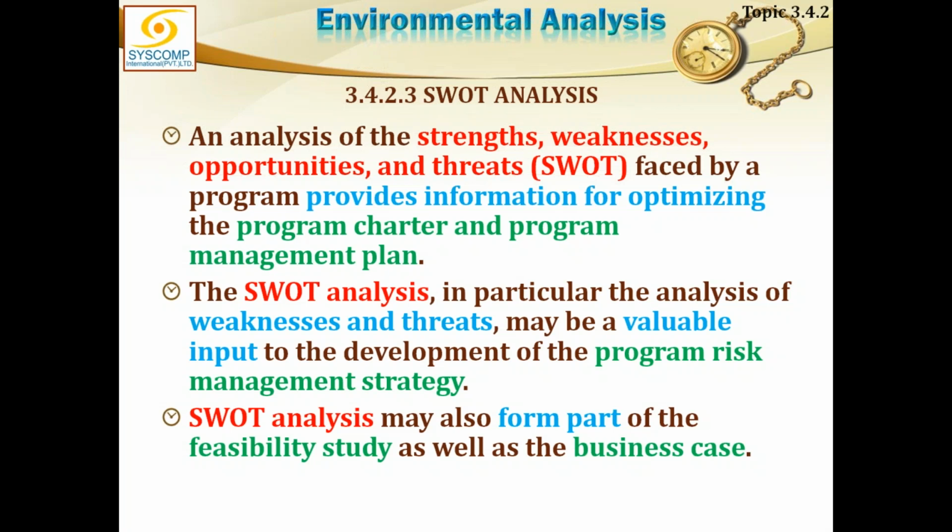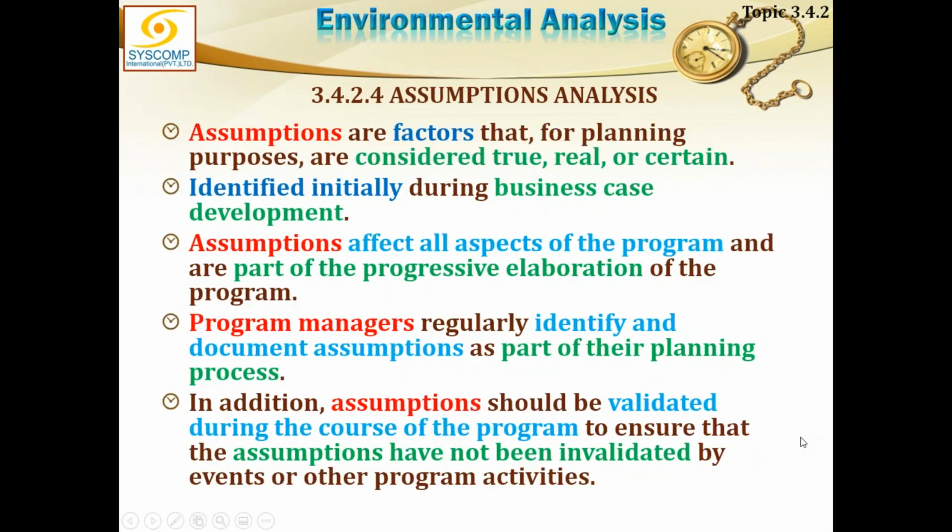The SWOT analysis, particularly the analysis of weaknesses and threats, may be a valuable input to the development of the program risk management strategy. So this becomes a major input into the program risk management strategy. SWOT analysis may also form part of the feasibility study as well as the business case. Yes, of course, when you are creating those documents, the business case and the feasibility study, you probably may like to use that.